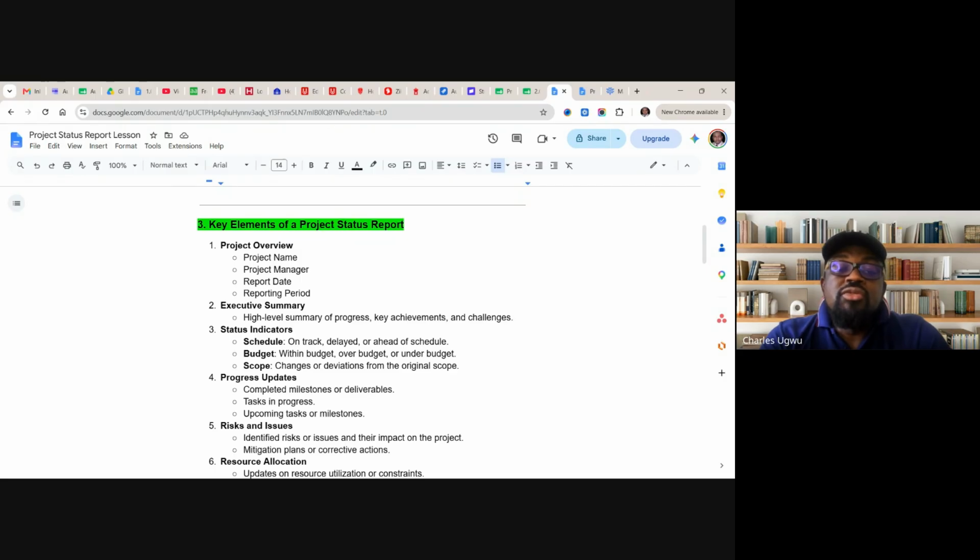So if you need to do it, it's always good to do it early enough, maybe on Friday. If you are reporting, the reporting period should be what happened from Monday till that Friday, the period you are submitting your report. So don't go and start writing reports about what happened even last month, from the beginning of this year. No, because you reported them. So that's why it's important to talk about the reporting period.